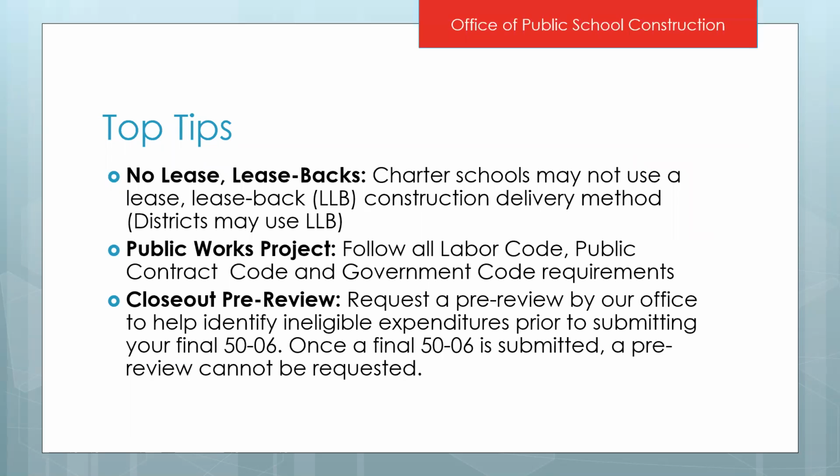Don't forget, this is a public works project since you are bond funded. So you are going to need to follow all labor code, public contract code, and government code requirements. You certify to all of these on the Form SAB 5004 when you are signing them, and on other forms as well. So make sure you are reading those certifications so you are aware of the requirements that you are expected to follow.